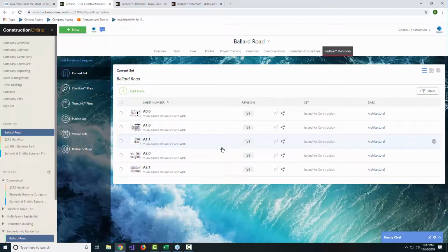And that goes back to keeping not just your internal team, but everyone else who might have access to these plans always with that most up-to-date set. Yeah, I think it's a really convenient option. Once the actual sheet itself has become shared, any revisions to that sheet will then be shared out as the version that people are looking at. I think that really can cut down on the amount of rework required on a project because someone just didn't have the latest version of page A1.1.